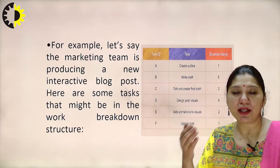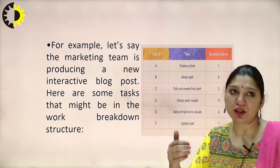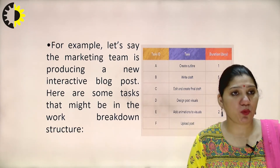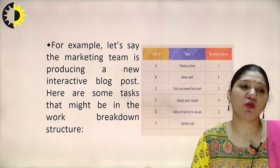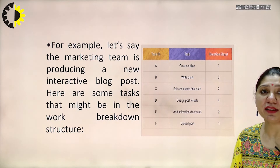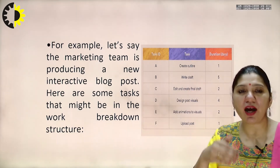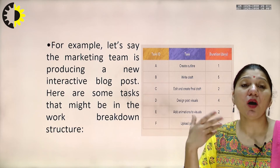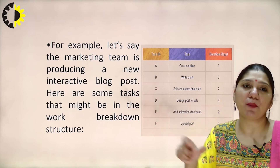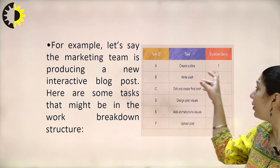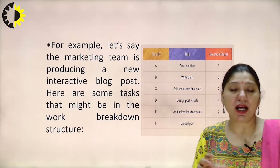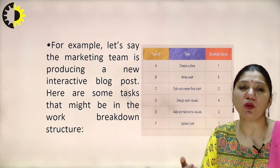For example, let's say the marketing team is producing a new interactive blog post. The first task, A, is to create the outline — what should happen in the project, giving it detail. The duration given is one day, during which we do the whole analysis and project understanding. The second task, B, is to write the draft of the project. First we do the analysis and identify what to do, then we produce a complete draft — the documentation of that project. The duration given is five days.